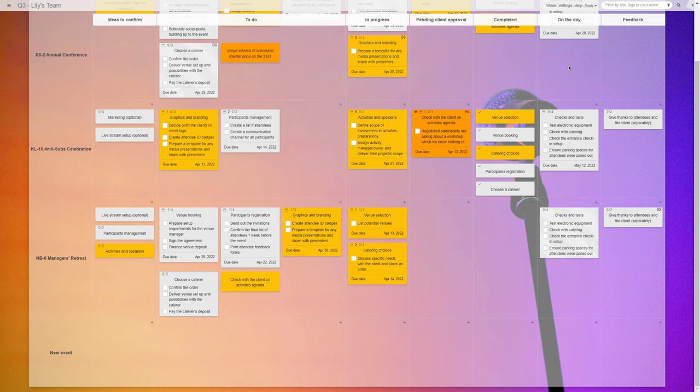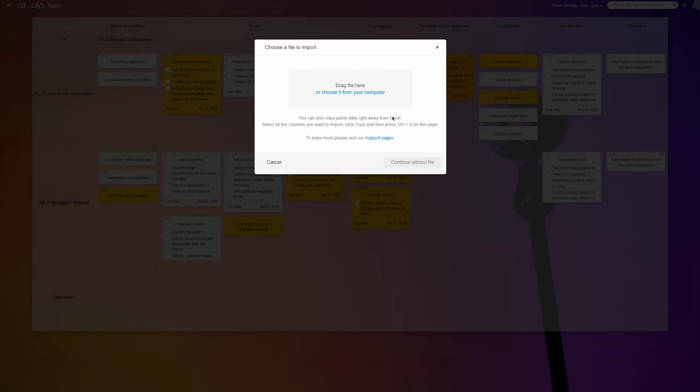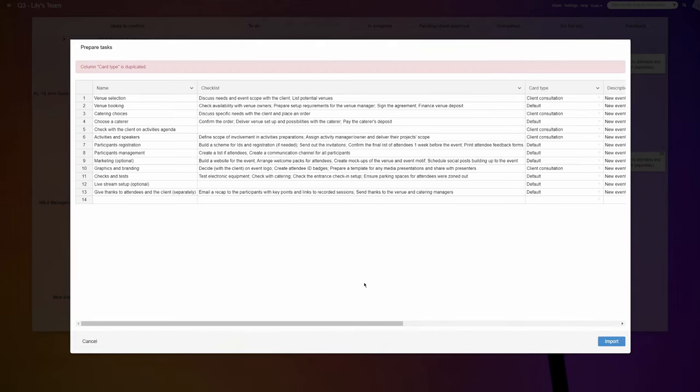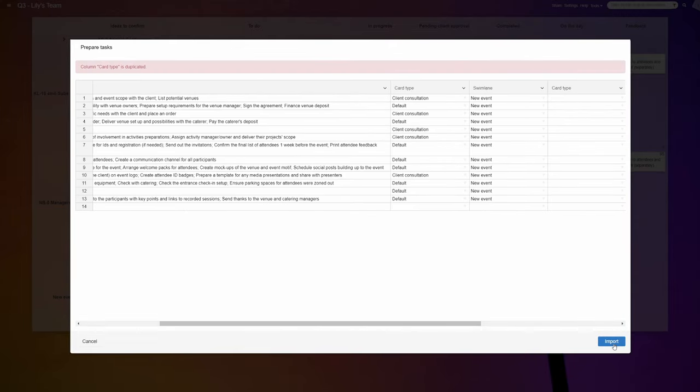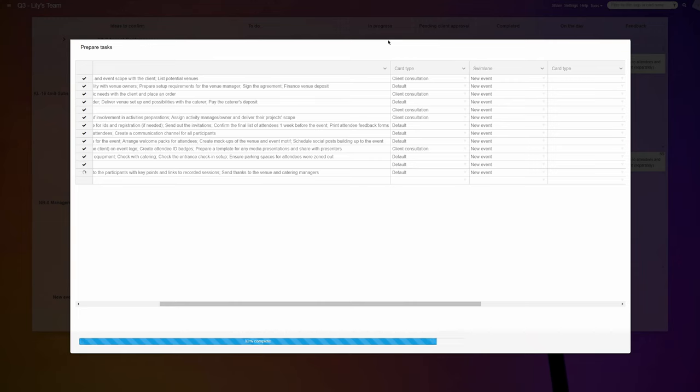Because the team's processes for each event type have been tried and tested on many past functions, when a new project starts, they upload a bunch of standard tasks for the event onto the board, saving time and making sure no jobs get forgotten.